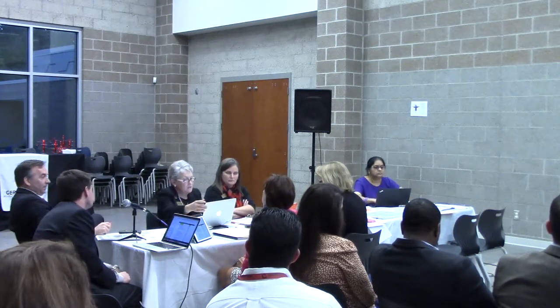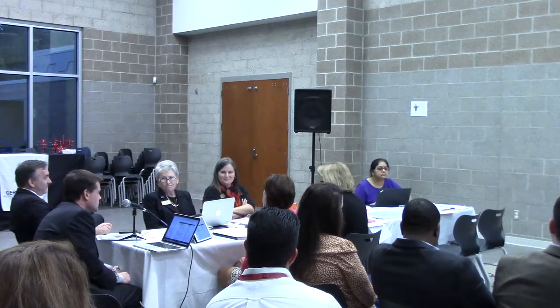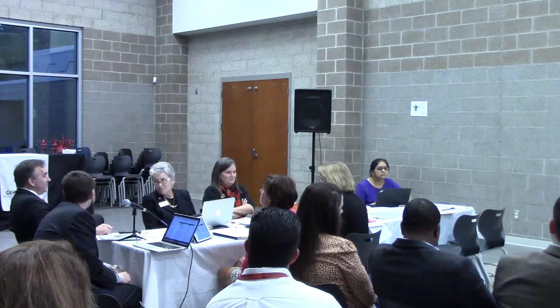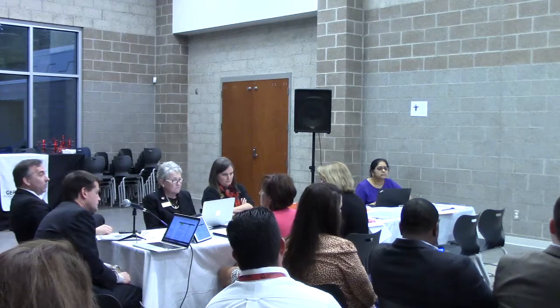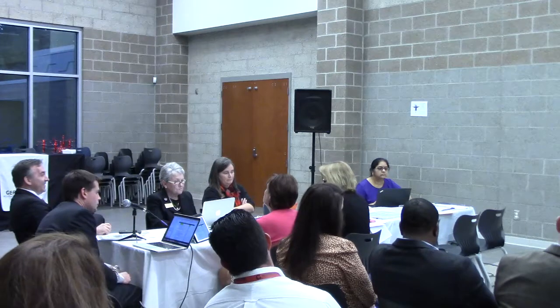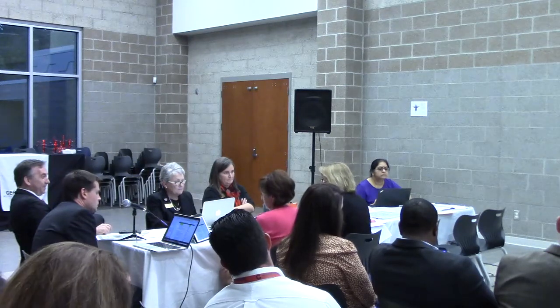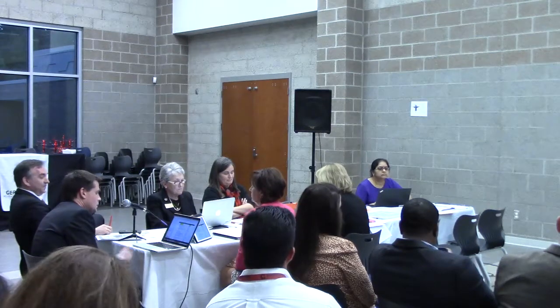Well, we can individually prioritize what we would like to have done and then let Mr. Cathy know. And for the priority list that we have there, the reason they're listed in that sequence is it really is what will shut down school quickest. Oh, sure. So if you notice, the HVAC is on there because we don't have heat or air, that's one that starts. Well, y'all are the experts on that, in my opinion. Between you and the administration at the schools, y'all know best what priority it needs to go in.